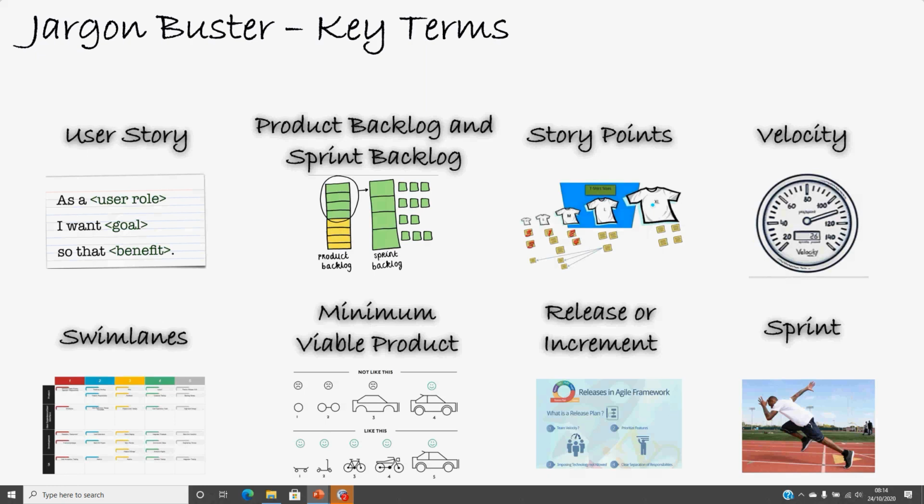So they will pull user story 1 from the product backlog into their sprint backlog, and they say that this sprint is going to be only for 2 weeks, and then we will deliver the product based upon this user story 1. So for the next 2 weeks in that sprint or in that iteration, they will work upon their user story 1. They will create a product out of that.